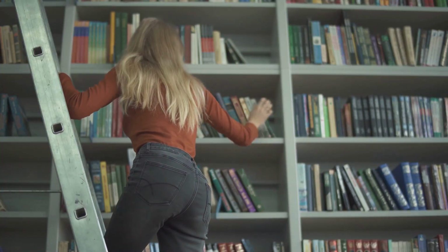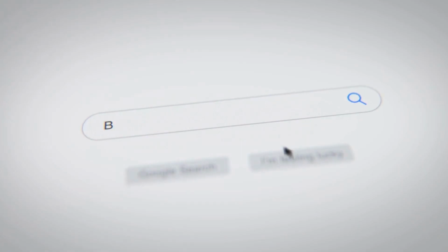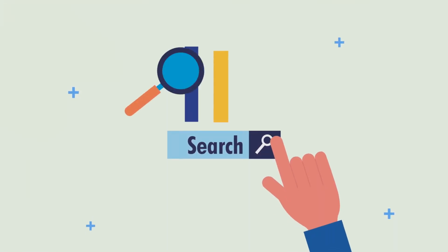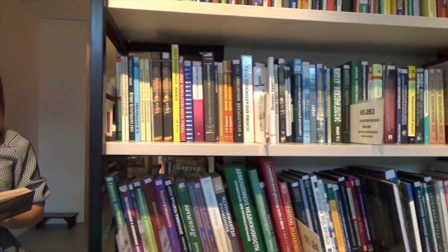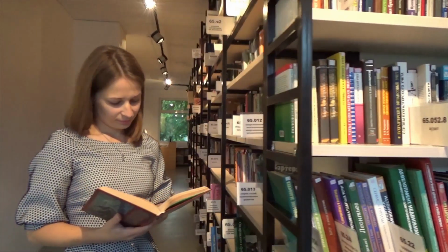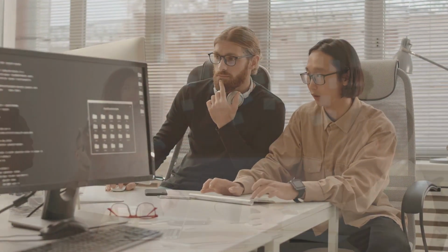Given I am on the library website, when I enter the Hitchhiker's Guide to the Galaxy in the search bar, and I click the search button, then I should see a list of books containing the Hitchhiker's Guide to the Galaxy in the title. This syntax clearly outlines the desired behavior, making it easier for developers to implement the feature.